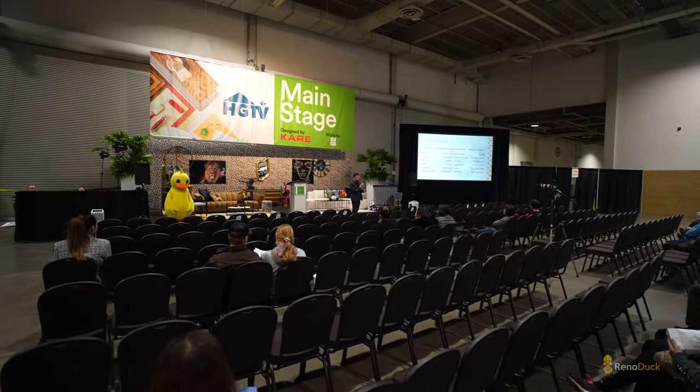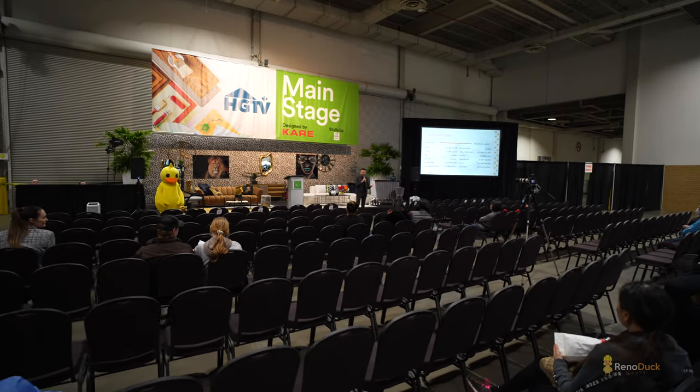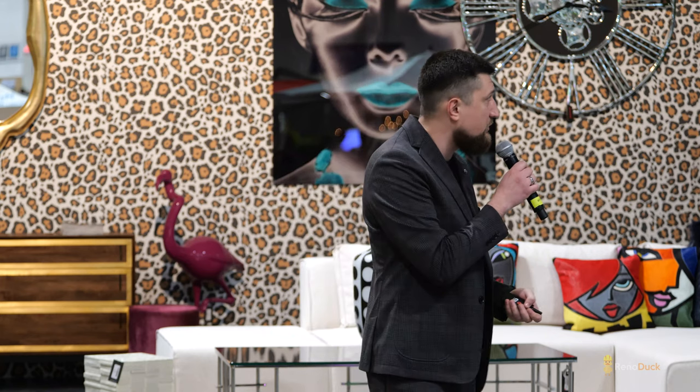And demolition, if your basement is currently finished, depending on what's inside of the basement, your demo cost is going to be between $3 and $7 per square foot. Also, of course, that cost is going to change slightly depending on the size of the basement too. Again, it's not linear. Consult with your contractor. They're going to be able to help you out.